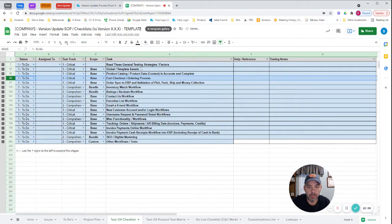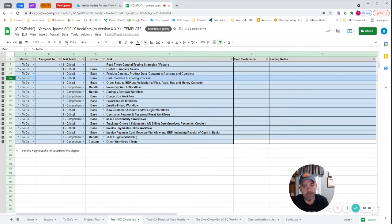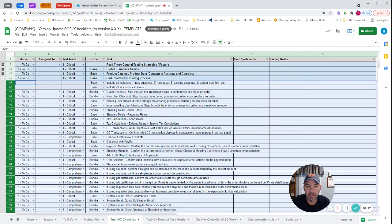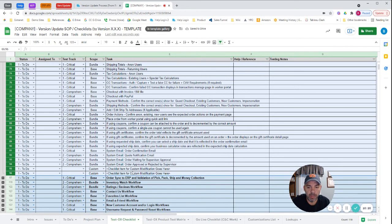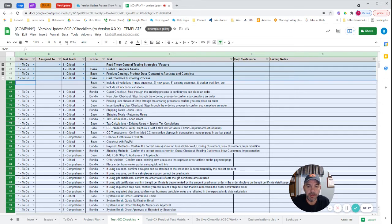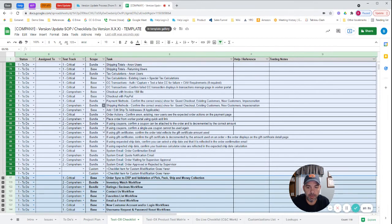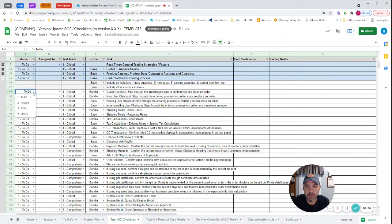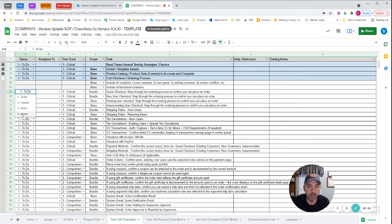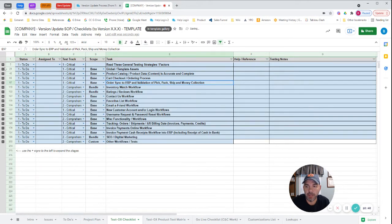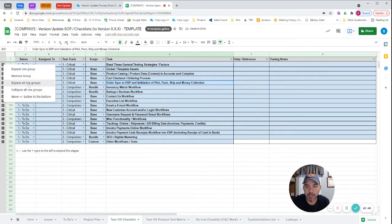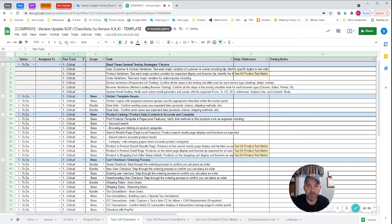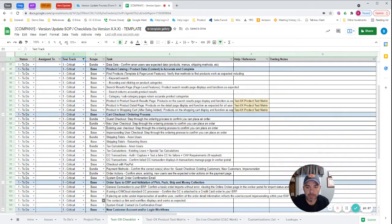The other factor that's in here, so the goal here is you would mature and expand out this testing checklist. This is a basic starting checklist that has a bunch of core functionality in it, and it's got some spots where you can add custom functionality as well. And you can add more lines to this, modify this. This is the responsibility of the lead operator and the project manager to maintain this. There's also notables here where we've identified, is this in base package or an add-on bundle, or is it a customization that you would add those? You can also basically use this status as, is it a to-do or should I ignore it? There may be scenarios you want to ignore stuff, and then is it passed or failed? So the concept here, if you were just doing a critical, I can expand all the rows if I was doing a critical, and then I could do a filter to just show me the critical steps and run through this.